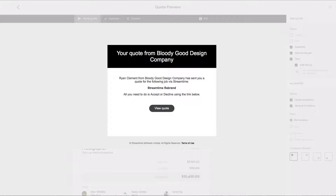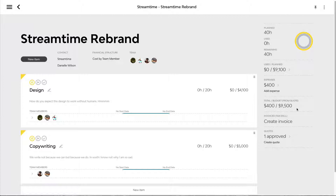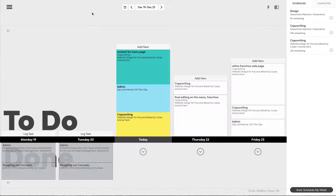This is what the client will receive. Once they're happy with it, they can view it and accept or decline it online, and then you'll receive an email. It will also actually change your budgeted figure to the quoted amount. So if you've sent multiple quotes and three or four of them have been accepted, they'll all add together and end up as your budget. Now that we've got the job set, sent out the quote, and it's all been approved, we can start to kick things off and send it to our users to begin the work. We just hit play against all the items that need to be started.